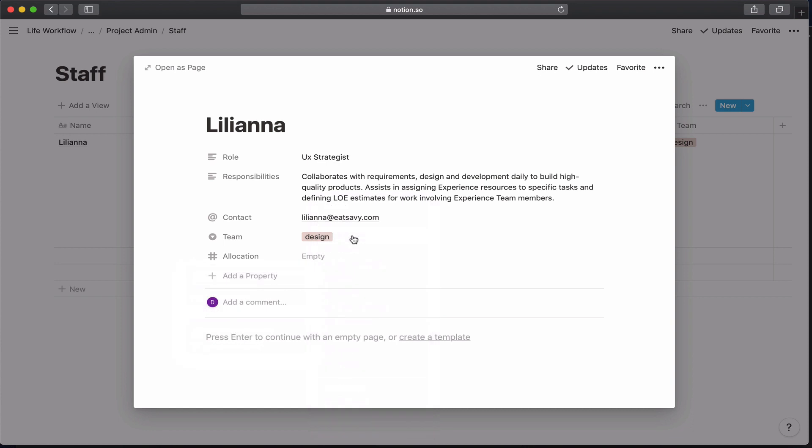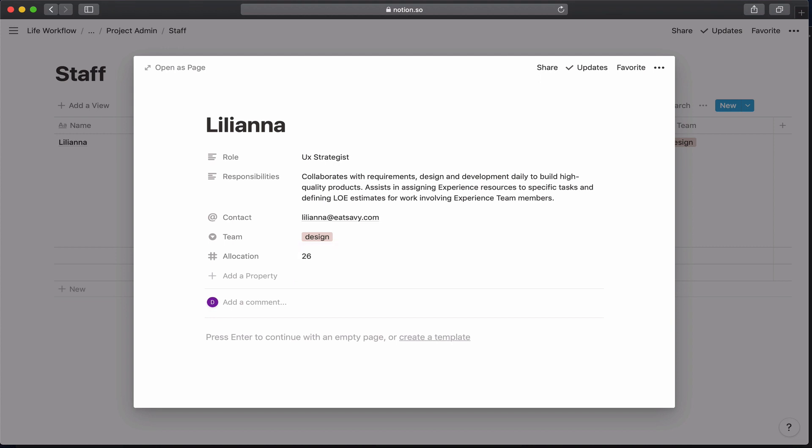I'm going to make it a number. And when I think about the allocations, I'm not just thinking about how much time she has for the week. I actually want to do it according to our sprint plan. So we have two weeks per sprint. So I want to see how many hours she's working in the two-week sprint. And that's going to be 26 hours.